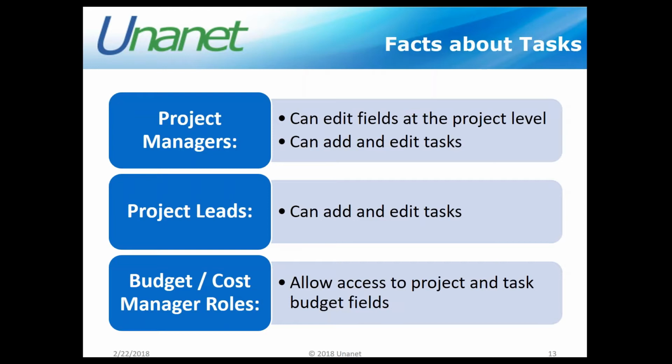There is one area I do want to share with you, little facts about tasks. So we know that in Unanet, this is a role-based system, and our security access comes through our organizational access. And so the roles that are assigned to us as users allow us to see and or edit different pieces of information in the database. So as it relates to tasks, I want to share with you that the role of project manager, we know, is a very powerful role within Unanet, and that role can edit almost every field on the project, but they can also add and edit tasks.